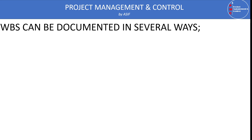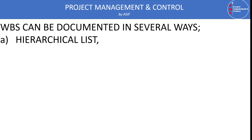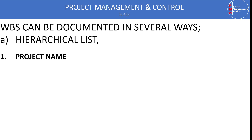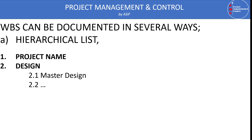The WBS can be documented in several ways. Number one is the hierarchical list. In a hierarchical list, we make our listing — for example, item one is the project name, which is our level zero or one. Then we have the next deliverable or mega deliverable, like the design stage, which can be further decomposed into master design stage, concept design stage, schematic design stage, detail design stage, and IFC drawings. The next mega deliverable may be procurement.